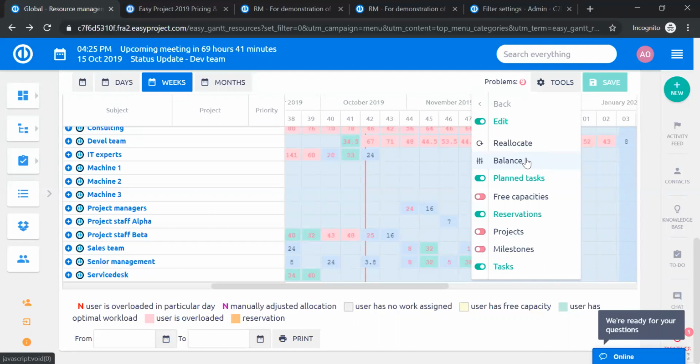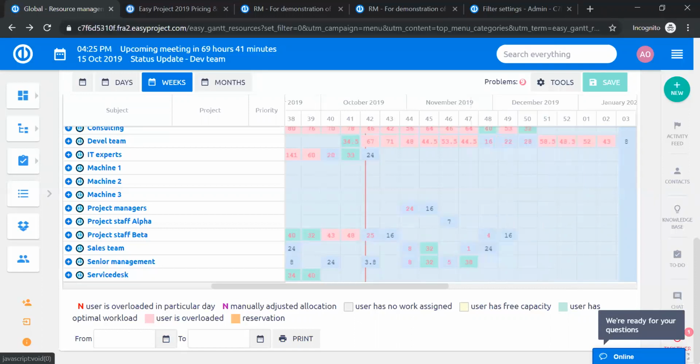Once the balancing is finished, any newly created vacations are not taken into account anymore. So it will take into account only the vacations that you have had noted in the system before, but not any future ones. Any new vacation won't adjust the balancing anymore. But if you have some new vacation, then I suggest that you use the balance button again. And once you use the balance, always make sure that you hit the Save button to keep all the changes that resulted from the balancing process.